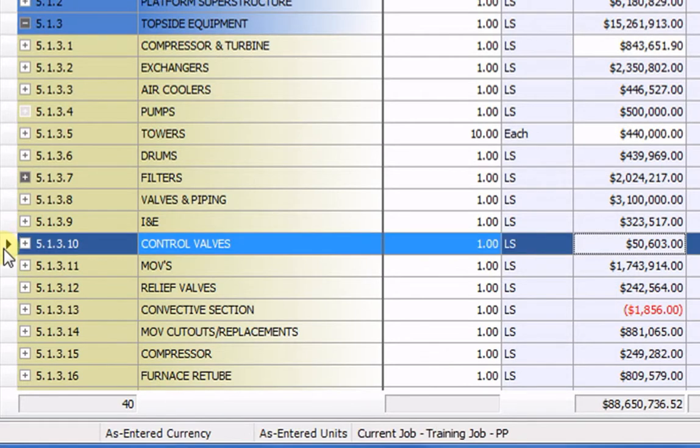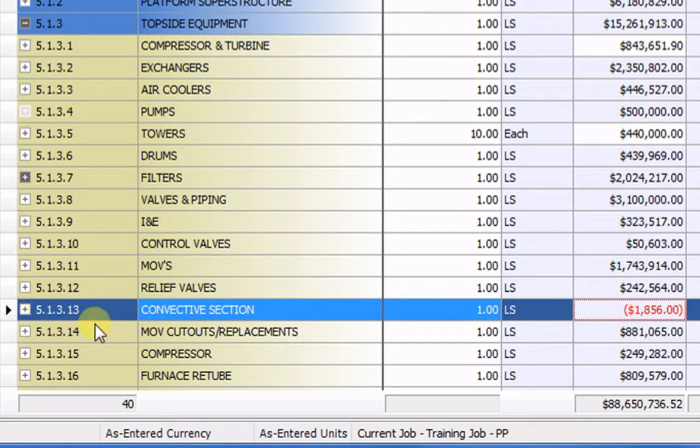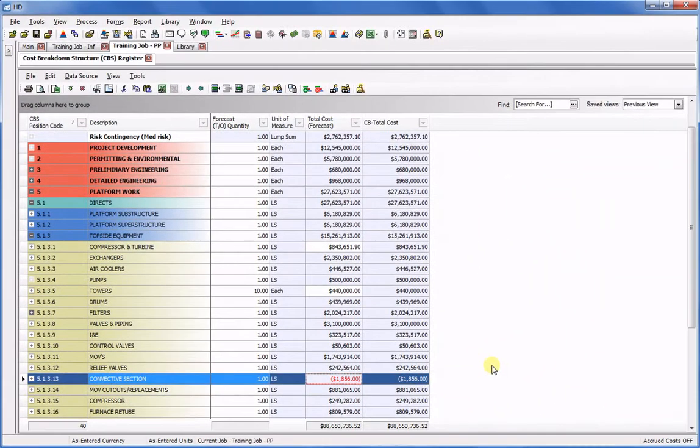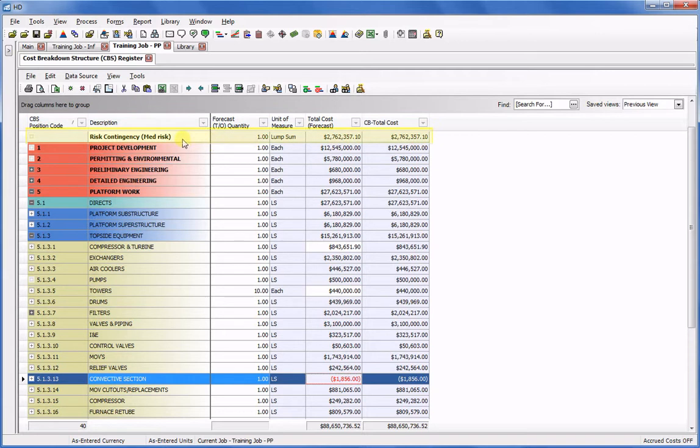I've already moved budget money from my convective section cost item, making it a negative amount, but I know I can still draw more from it because I know I'll be getting additional funding later on, or I'll be able to cover it with some of my contingency dollars. But I don't want to be held up on making a change now.